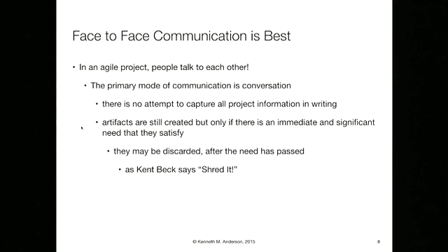And so, for instance, we'll talk about user stories in the weeks to come. User stories are often written on index cards. They like to have a physical manifestation of the story if you can, so you can put it up on a board. You can move it around your environment. This is not being worked on. It's being worked on. It's got problems, etc. But as soon as you've got the user story done, Kent Beck, who is a guy that we'll talk about in a minute, says just take it and shred it. You don't need it anymore.